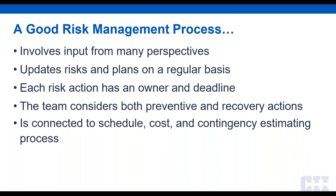Here are some keys to a good risk management process. First, it includes many perspectives — this is not the kind of thing where you want three people to sit down and create your risk register unless you have a small and very straightforward project. A good risk management process is evidenced by the project team updating risks and risk management plans on a regular basis. The risk management landscape always changes. Now we have new risks due to COVID-19: governors have said construction can continue, must stop, or some types can continue and others must stop. These government actions are risks — when will they be changed? Will construction be closed again? Will there be a second wave of the virus?